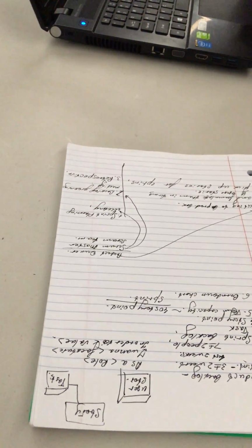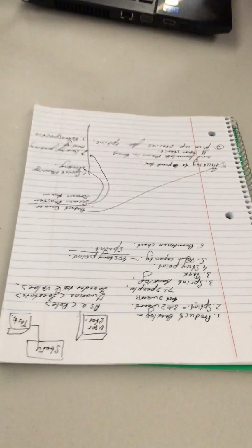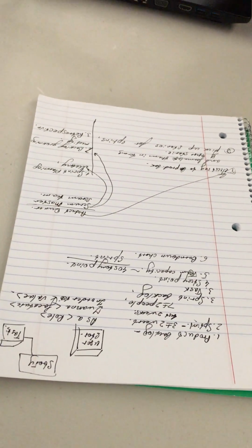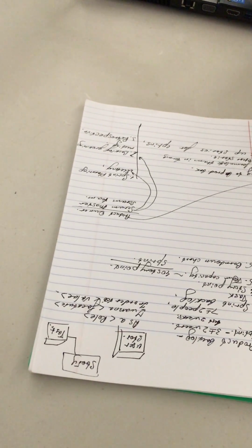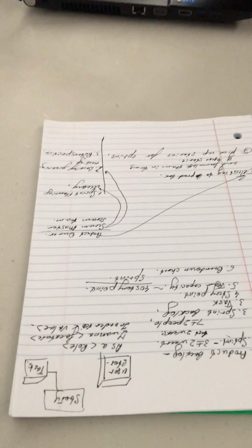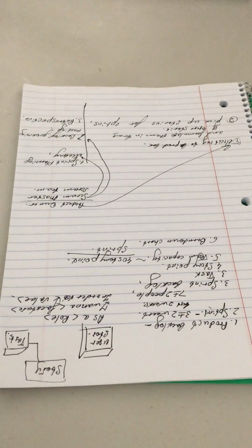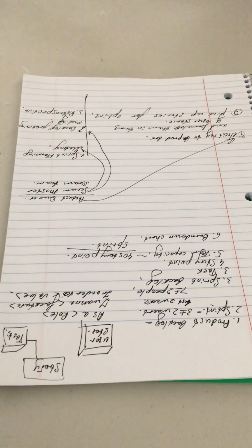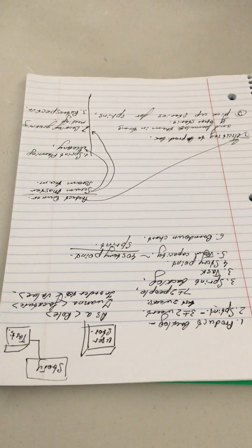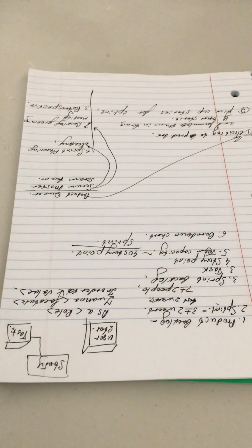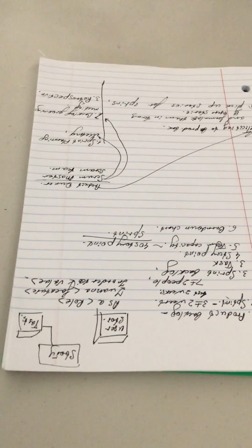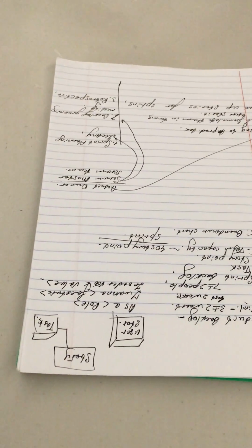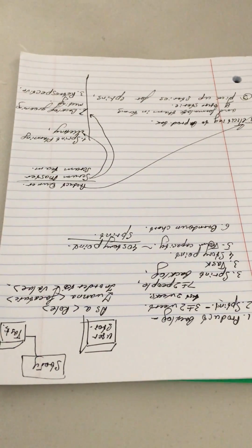Next, before the upcoming sprint, the product owner may decide to re-include the story into the next sprint if it's so valuable, and the team will continue where it left off. But the product owner may also say, we don't want to spend any more time on this, let's take it somewhere else, or maybe in 2 weeks or 10 sprints or whatever, and now we're gonna go with something else. But all uncompleted stories go back to the end of the backlog at the end of the sprint. That's why for a Scrum Master, it's better to make sure that everything is gonna get completed.